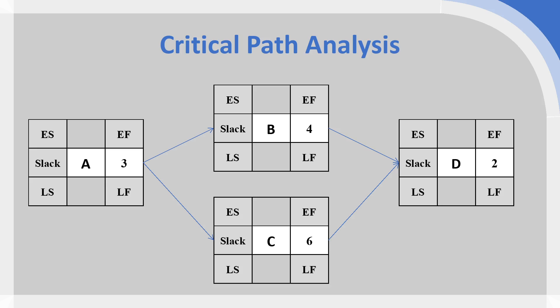Every project we start with zero, because starting on day one knocks everything out of whack — activity A takes three days, so if the early start were day one, one plus three would give an early finish of four, which is misleading. So we put zero in the top-left of activity A: the earliest it can start is day zero. Adding three gives us an early finish of day three.